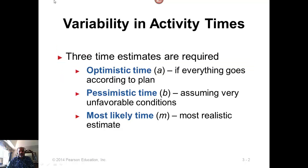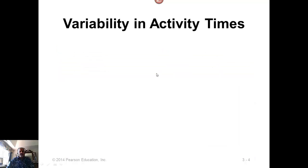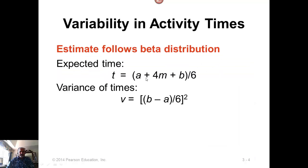Beta distribution has three time estimates: optimistic time on the left-hand side, pessimistic time on the right-hand side, and most likely time in the middle, with the pessimistic time kind of extended further out than a. If we assume beta distribution, then the expected time for the activity can be computed using this formula. This comes from beta distribution: a plus 4m plus b over 6. And variance for activities will come from this function. It doesn't include m, but it is b minus a over 6, the whole thing squared, or b minus a squared over 36.